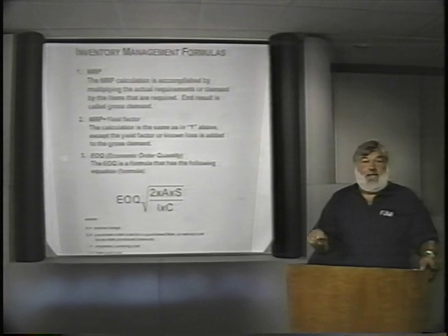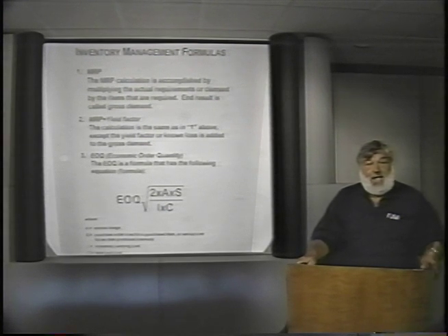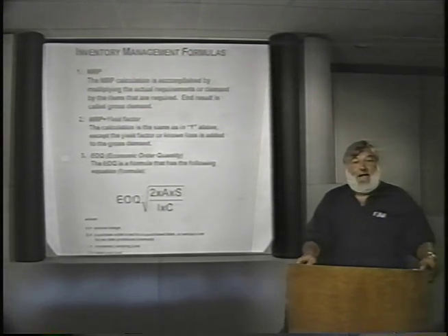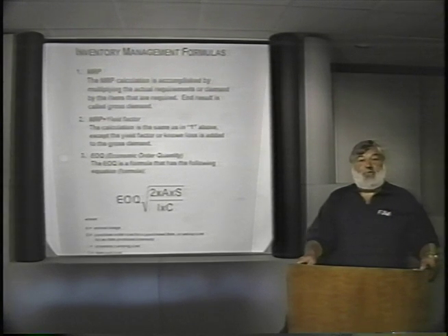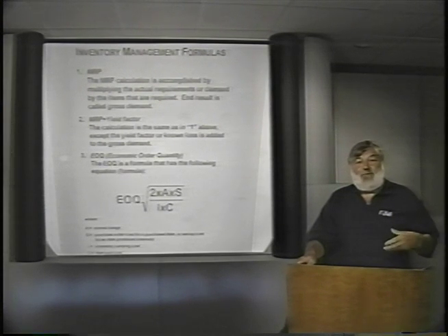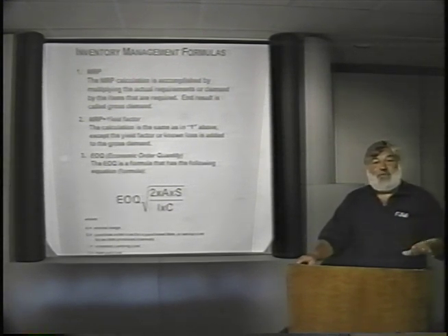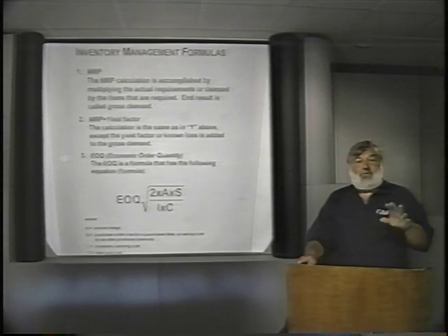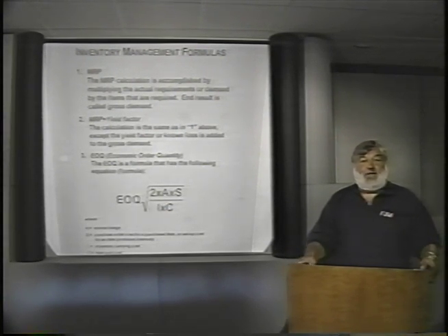We want to make sure that the total purchase cost of the item is charged to the job. Therefore, the yield has 0 value, and we certainly don't want to put that 5-foot piece of special 3-inch aluminum pipe into the storeroom and start to generate stocking requirements for those items that may never be required. Keep the storeroom simple. Charge the yield to the job and dispose of the yield through normal disposition.